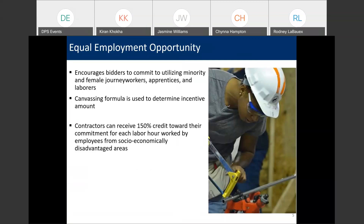There are caps for the amount of participation you can get for purposes of calculating the incentives, but there are no caps on what percentage of work can actually be performed by women or minorities in these categories. The caps which bidders can propose are up to 15% for female workers and 70% for minority workers for this incentive. There's actually a formula you have to complete, and in each part of the formula, you commit to a percentage of women and minority workers for each category, and then you complete a calculation to get what we call an award criteria figure, which is the basis for your bid evaluation. Contractors can receive 150% credit toward their commitment for each labor hour worked by employees from socioeconomically disadvantaged areas. The ordinance also provides for damages to be assessed if you do not meet your commitments.